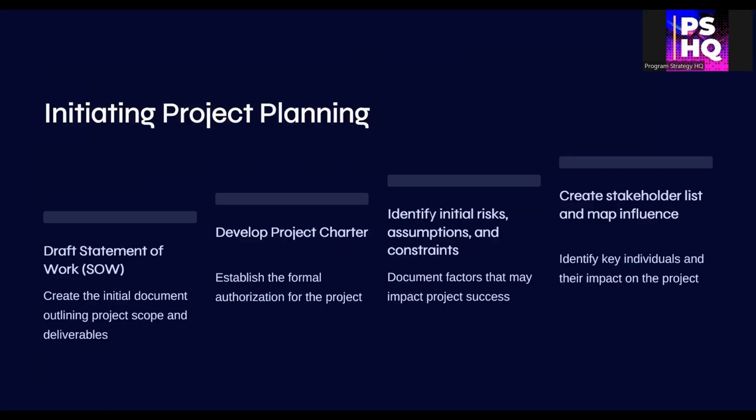Initiate project planning. Draft the statement of work. This is your contract with the business. Create the project charter, the formal authorization to begin work. List key assumptions, constraints, and risks upfront. And then identify your stakeholders and assess their level of influence and engagement.